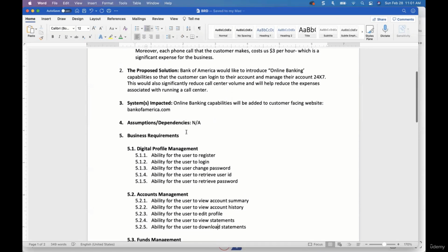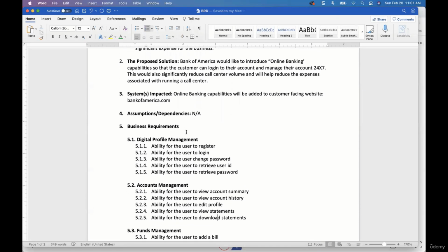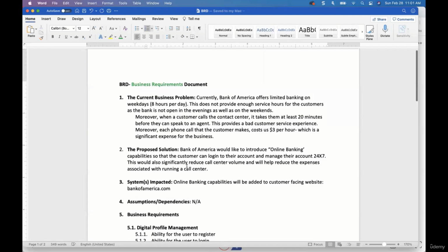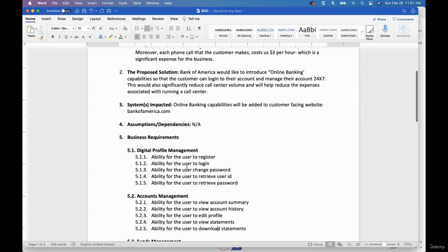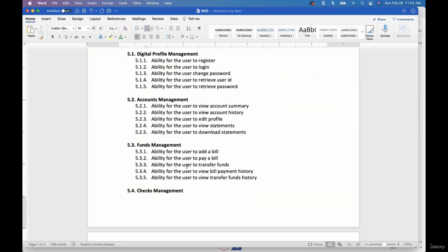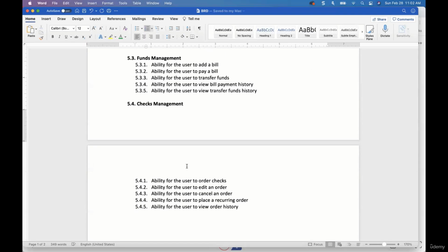So basically, what I do after this is I set up a meeting with the business owner once again, and I walk him through the entire BRD. And I say, this is what you told me, this is what I have. Are we on the same page? If we are, what do you need to do? What do you ask him to do? Review the BRD and approve it.